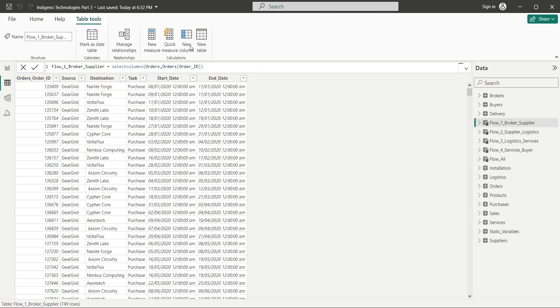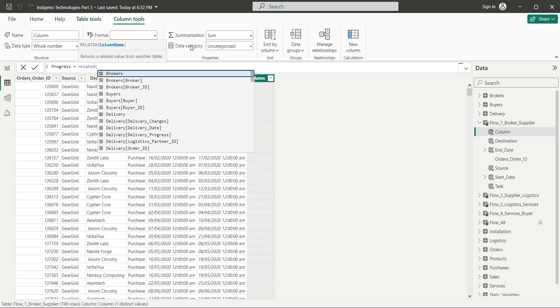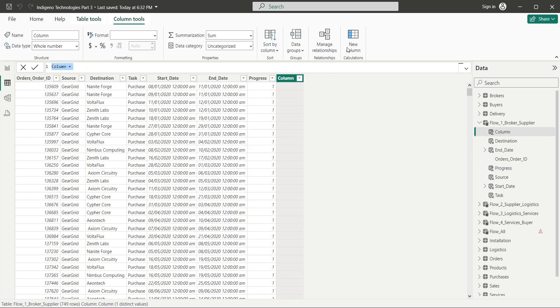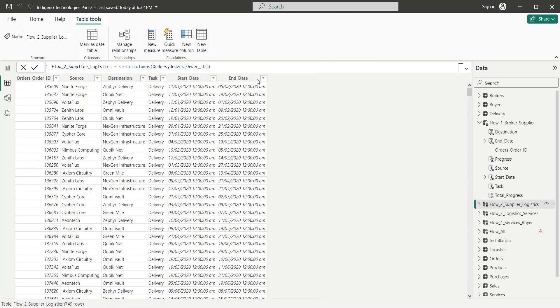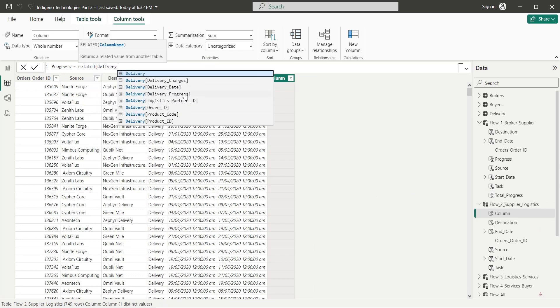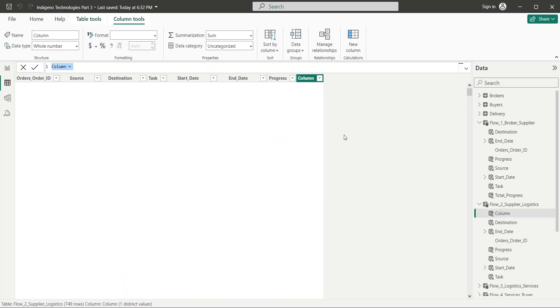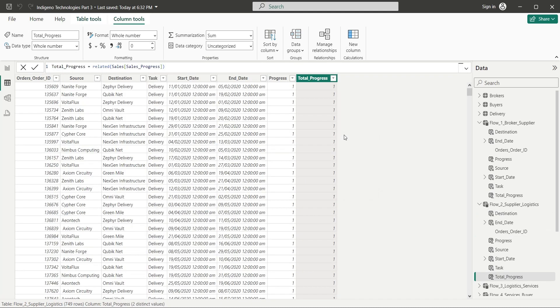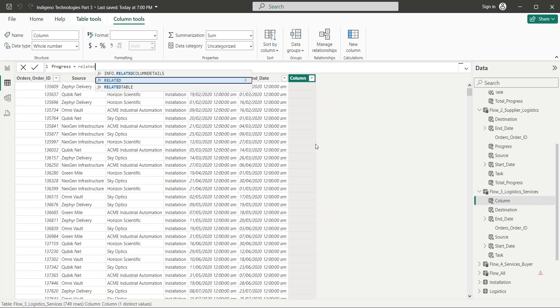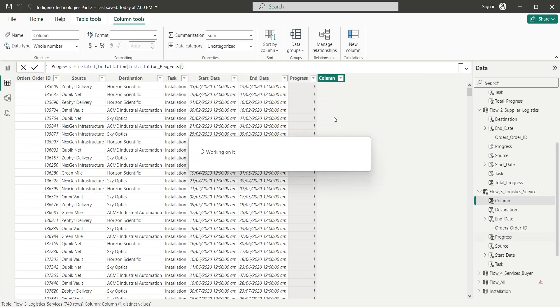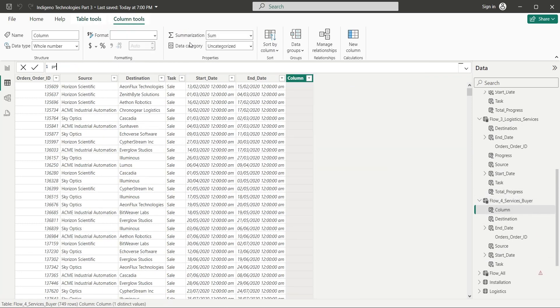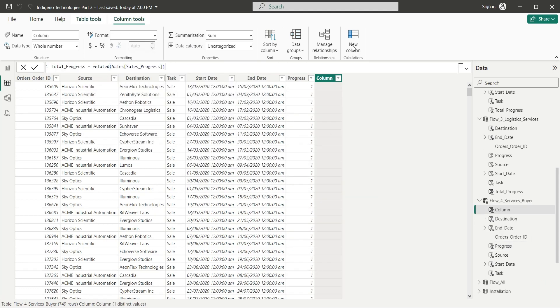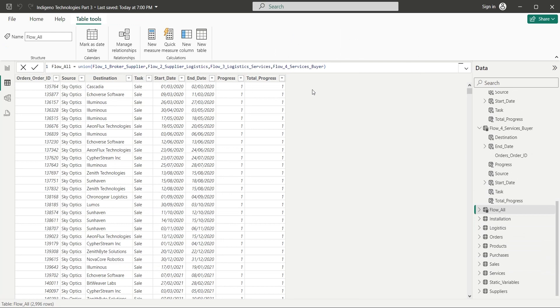We will also add two columns for progress. One will show the progress of current task, while the other will show the total progress from sales progress. The total progress will be same for all tables and will be used later to filter sales currently in process. While the individual progress of each task will show their own percentage of completion in the dashboard.